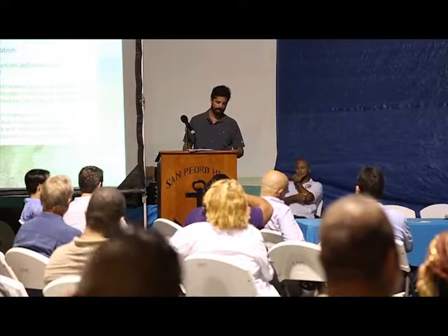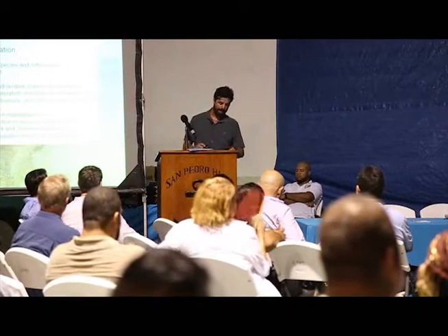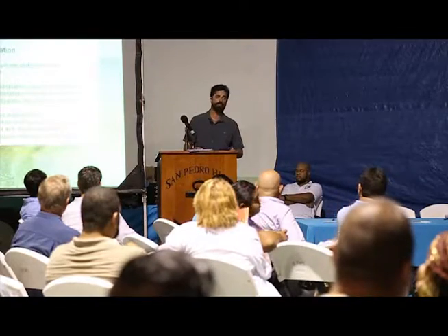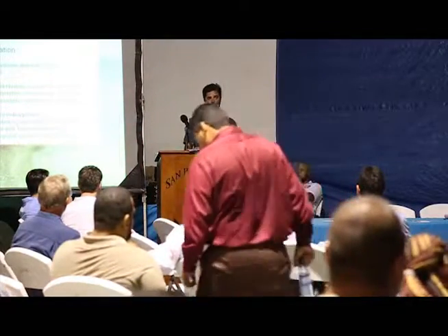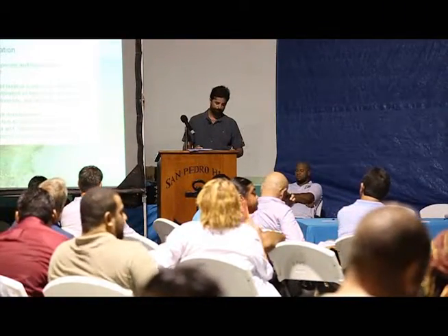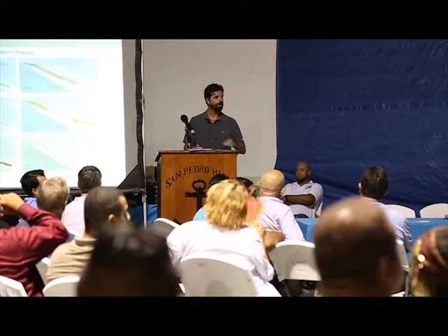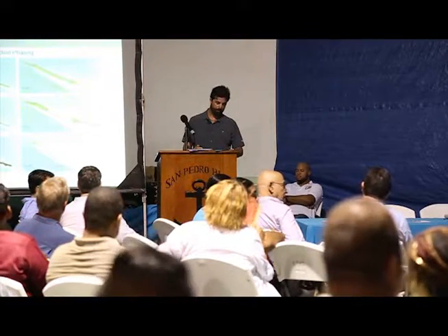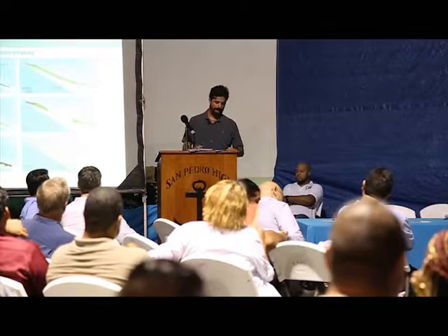The carrying capacity of the key, as well as diversity, abundance, and stability, will be elevated. A dedicated group will be trained in order to manipulate any fauna, species, or individual that will be encountered during the construction process, and it will be properly manipulated, taken care of, and if necessary allocated in other places. In order to minimize the impact derived from the construction, we will also follow a phasing process in order to identify the valuable areas, minimize the access points, create the nursery, and have control over the crews around the island.